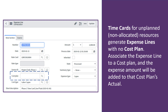We know life happens. Sometimes resources won't be properly allocated in niche situations where somebody steps in or specialized expertise is brought on site before we can allocate them to a resource plan. In those cases, ServiceNow still generates cost, and you make sure that those costs via the expense line go to the appropriate cost plan. That way you make sure that your cost actuals are the most actual actuals.